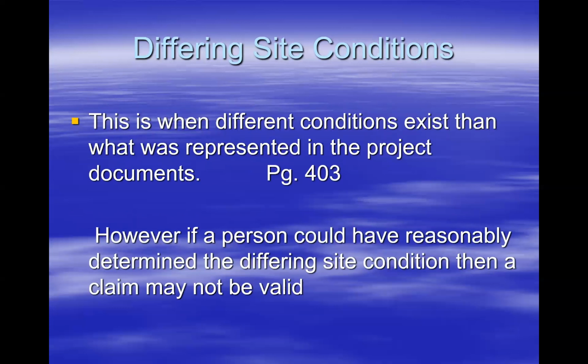Hopefully by now you guys have heard the term differing site conditions. This is when different conditions exist than what was represented in the project or on the construction documents. Oftentimes when we think about differing site conditions, we think about the physical site, the dirt. Let's just say we're out there, we're digging along, and all of a sudden we run into some type of huge boulders, let's say some granite boulder that we really had no way of anticipating. That is what's considered a differing site condition in one regard.